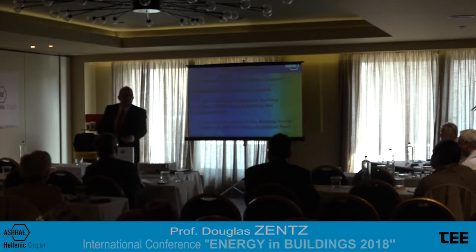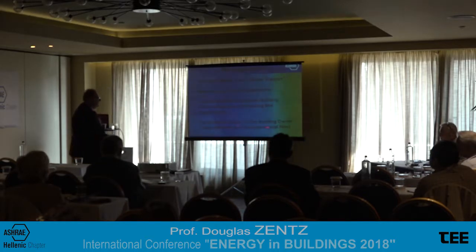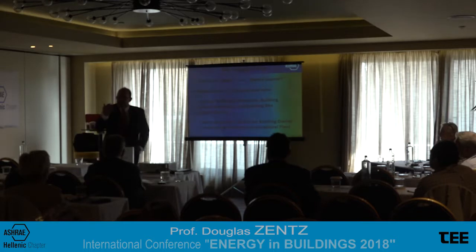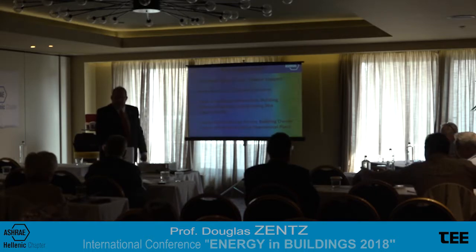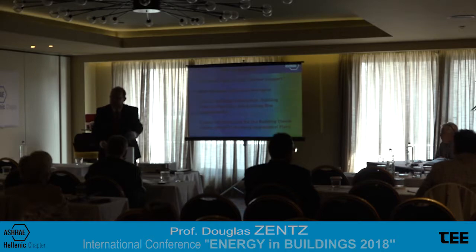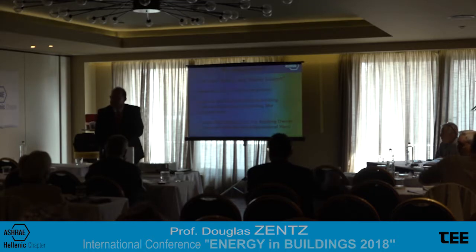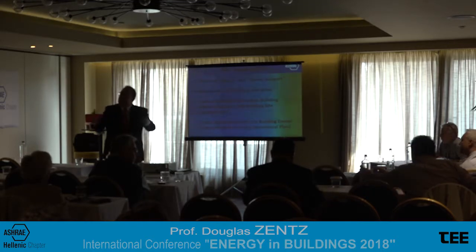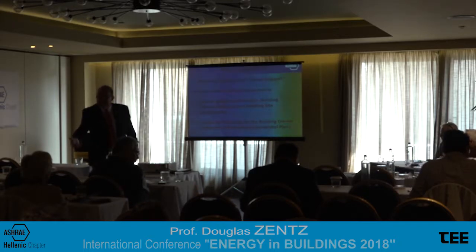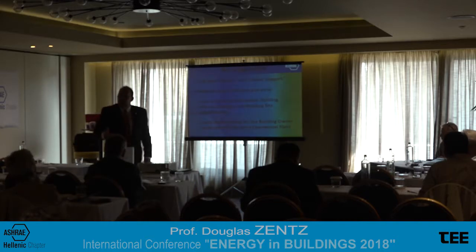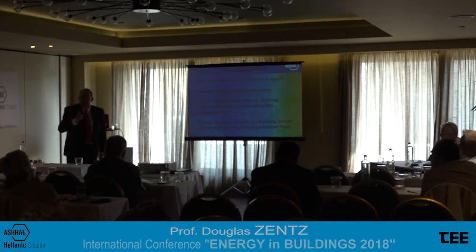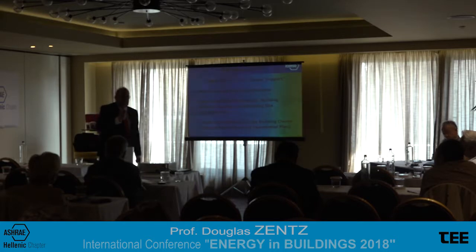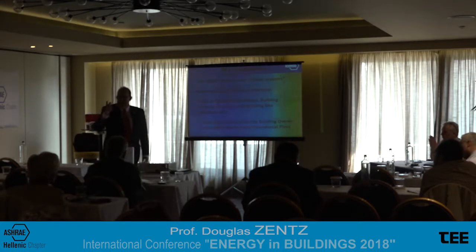No, they don't. What we need to develop, and I call it the BOP, the Building Operating Plan, we need to create a roadmap that starts from what is the purpose of this space, that then follows by here's the design and why to support the purpose, followed by the system description, followed by the commissioning reports, followed by the energy management controls and the temperature control system and automation system in the building. And everything needs to be tied together so that the building owner knows if they change the purpose of the space, they need to revisit all those things for sustainable operation. We need to tie it together for the owner. Firms that understand this and do it add value to the owner.